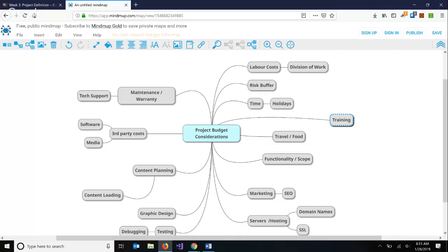It's hard to know how long it's going to take you to learn enough to then go and be productive, right? So because that's hard to judge, I'll typically say, I'm not familiar with this technology. So what I will do is rather than say, I'm charging you time for me to learn, I'd say if I was using ASP.NET, this would take me 100 hours. But if you want me to do this in Ruby on Rails, well, I'm going to need more than 100 hours. I just won't be as productive because I'm not as experienced. I don't know the technology. So I would just charge more in terms of the time here. Ken?